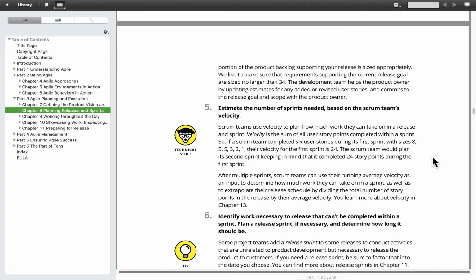Now, if you've only been authorized to work another 5 sprints and you've got 9 sprints worth of work, then you've got to begin to work with the product owner to make sure we get the highest priority work into the schedule that's approved. Okay, and talk about what's left over and whether they can come up with the funds to put more sprints on the schedule. Okay, so that's how velocity works.